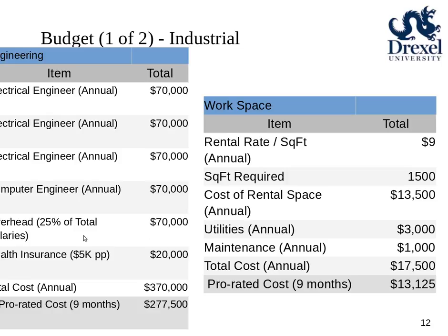So, budget. In our industrial budget, we've included the cost of engineers and space required to build the prototype. Everything is prorated to 9 months, as this is the length of our project for senior design. For choosing the engineer cost, this is a statistically average cost for engineers on the East Coast. And then some company benefits were included, and this was prorated over 9 months. So over a year, it's $370,000, but prorated it's $277,000.